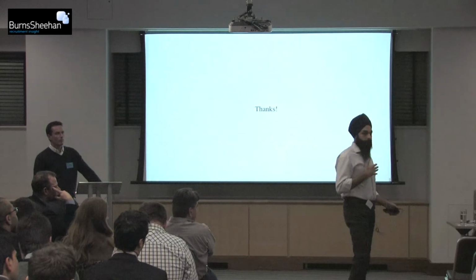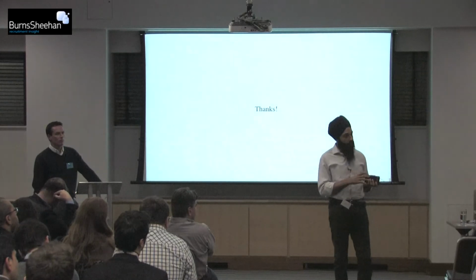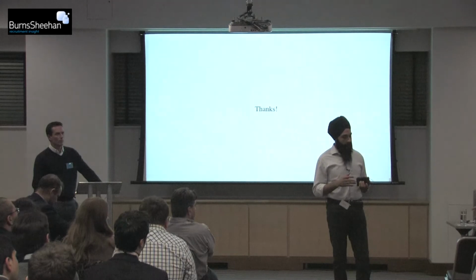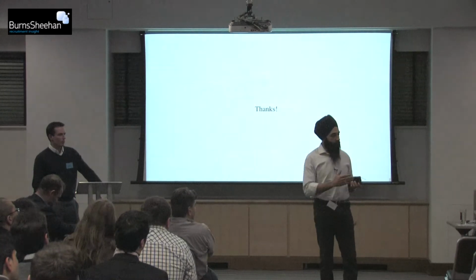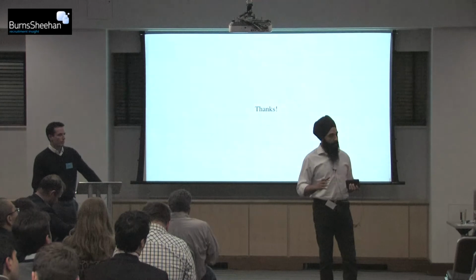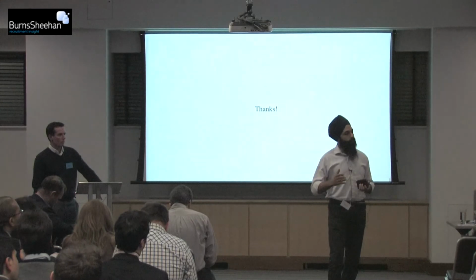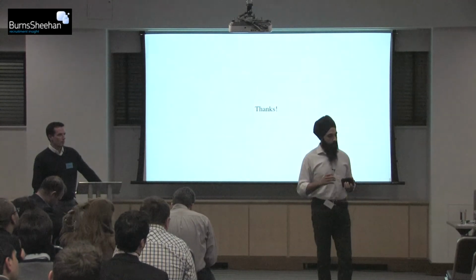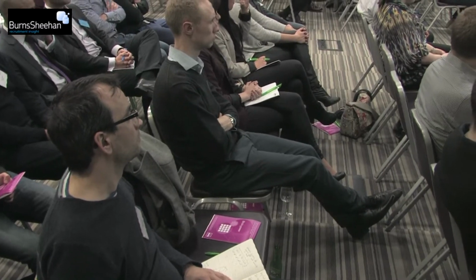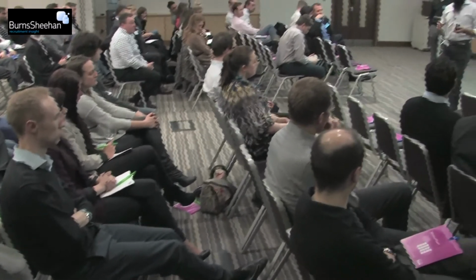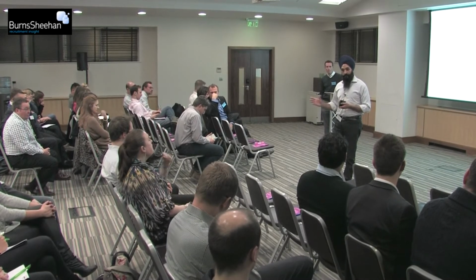Okay, yeah. It depends on the program that you're dealing in, because ultimately you also have to determine the technology that you're using as well. A good example is the number of bug fixes. As you monitor them, the idea is that they become less and less. That's basically saying, okay, something somewhere is working. Then the idea is to tie that up with the changes in process. When we increase the number of automated tests that need to be done, again, it's a metric. Shortening the amount of stories and then comparing those stories with what's actually being released and the quality, what actually comes back into test, et cetera. That's another way. So the metrics, like I said earlier, depend on what you're actually trying to deliver.